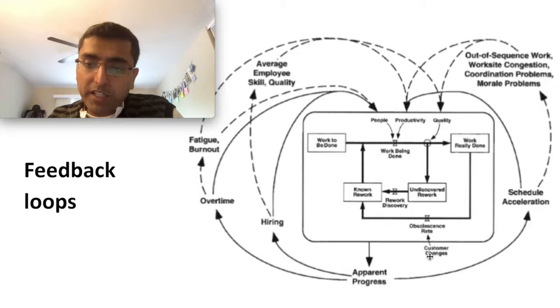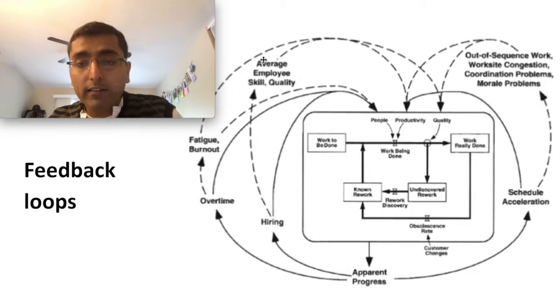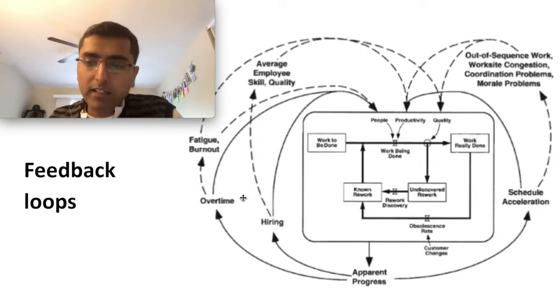When the customer changes their requirement, it has a huge impact on your team because they just did something and now they have to redo it. So they eventually burn out. They eventually lose faith in the system and then they leave. And so then you have to hire new people, and projects tend to be behind. And when projects are behind, you have to pay charges. In certain cases like the US Navy, you have to pay charges on a daily basis.